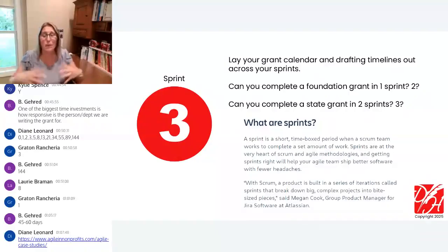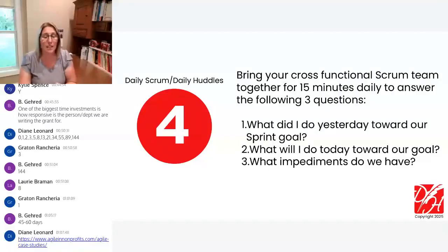Multi-million, multi-year, how would they feel progress over a period of time? And what they did instead was they set a 2-week heartbeat for the project. We'll check in, we'll talk about how we're doing, we'll talk about what's next so that we can sense our progression towards the big thing. That's a multi-year example, but it's the same idea, especially when we talk about big grants. Set a cadence and a heartbeat so that the team can feel progression towards the final application.